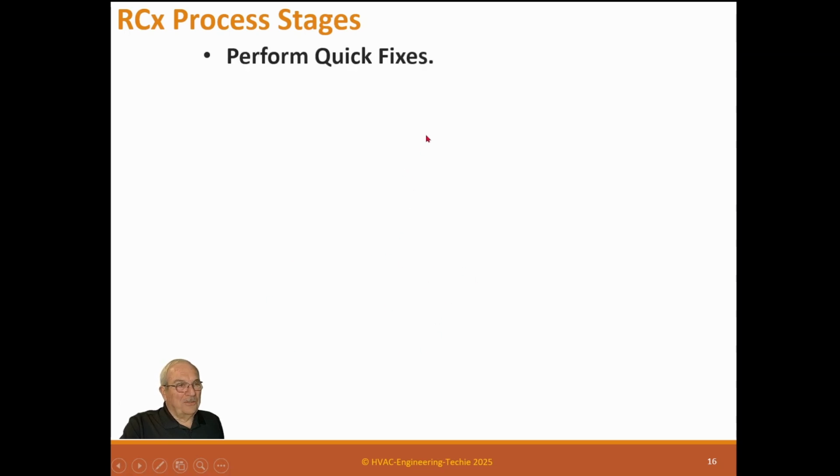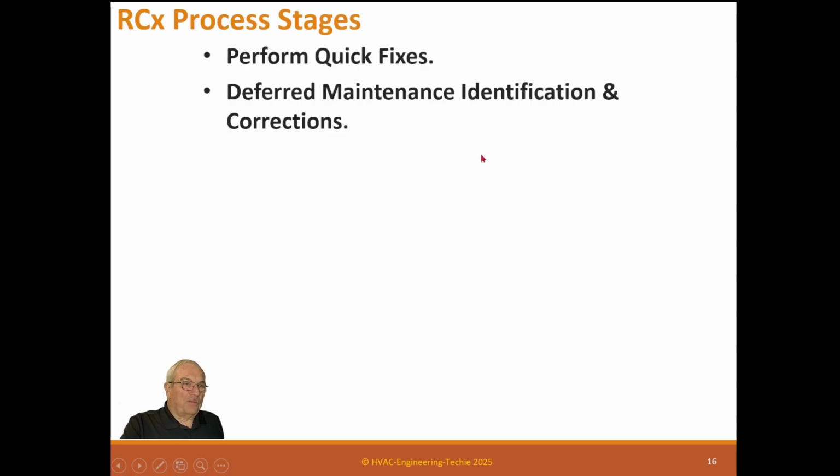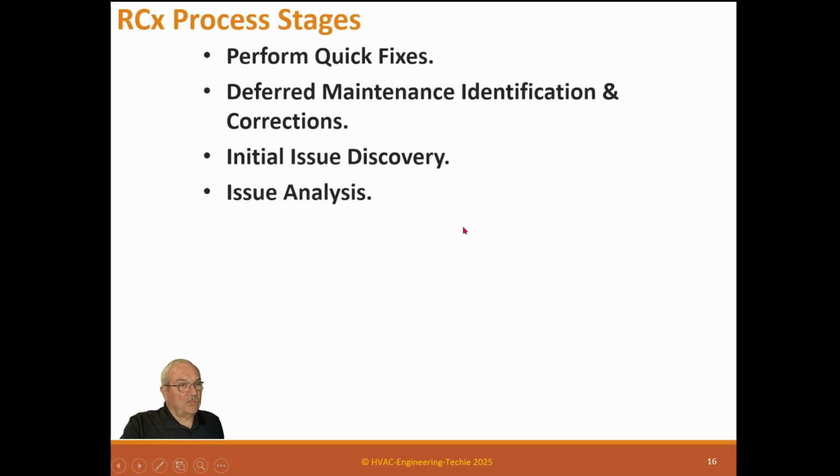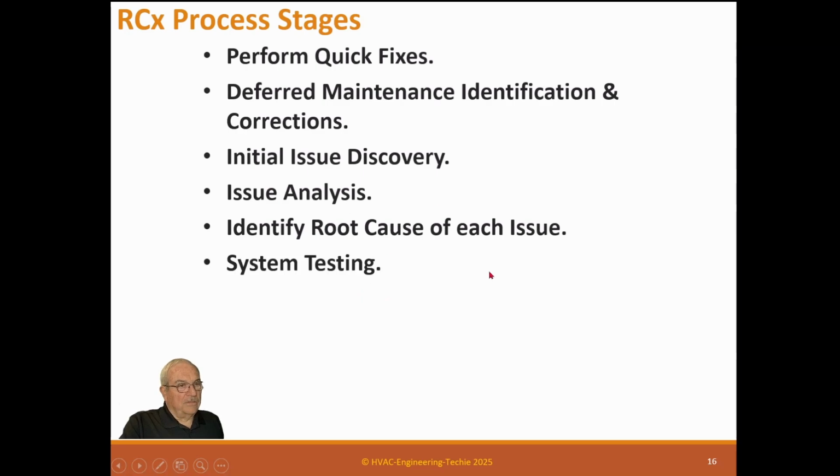We'll go through how you do that. So you perform quick fixes. You take care of deferred maintenance and identification corrections. Deferred maintenance you cannot leave in the building because it definitely will cover performance issues. Initial issue discovery, issue analysis, issue root cause of each issue, and we'll be telling you how you do all this stuff. System testing. Create the facility operating guide.